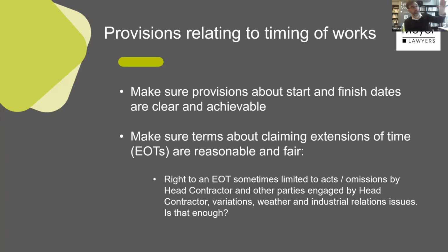And I should say where these provisions are heading is the issue of liquidated damages. Essentially, to the extent that the works are delayed beyond the finish date and you cannot get an extension of time, well, let's say that there's a finish date and then you're entitled to certain extensions of time that push the finish date back. Contracts will often say that for each day that the works are delayed beyond that extended time of finish, you have to pay X number of dollars per day. So really the game here is to limit that risk. And I'll talk into how we can do that from the liquidated damages side of things. But of course, if you can get the finish date extended to the time when you actually do finish, then you of course remove all that risk.